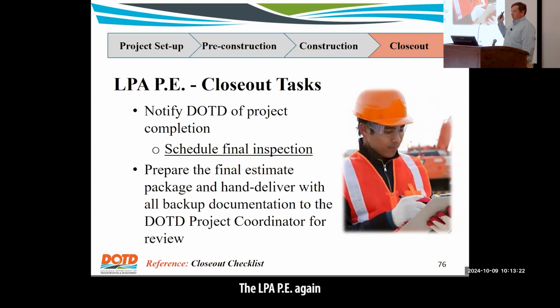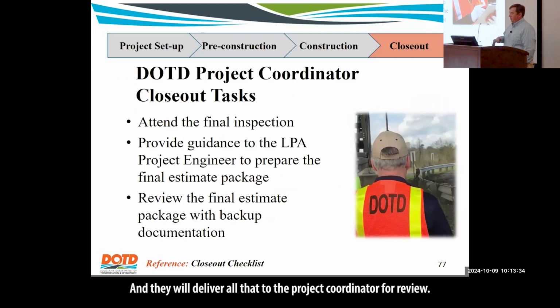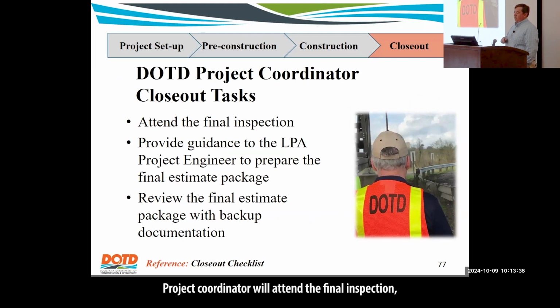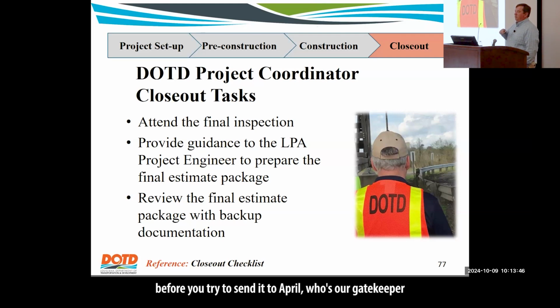All right, so the LPA PE, again, they're notifying everybody of the project completion, they're scheduling the final inspection, preparing final estimates, and they will deliver all that to the project coordinator for review. Project coordinator will attend the final inspection, provide guidance, and then they'll review the backup documentation to make sure everything's in there before you try to send it to April, who's our gatekeeper at headquarters, because then she'll go through it and go, no, you're missing this document, this document, this document. It goes back to y'all until you get that turned back in.